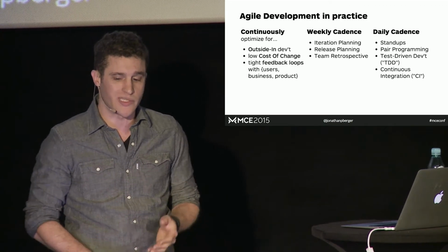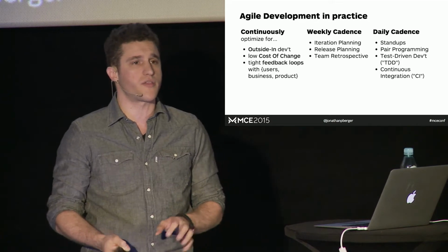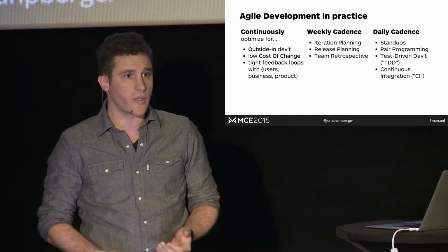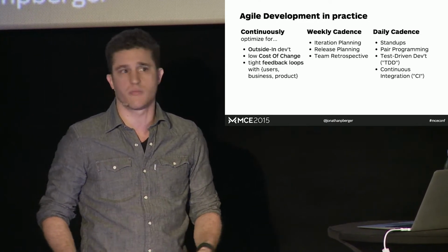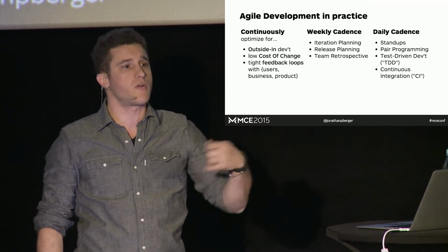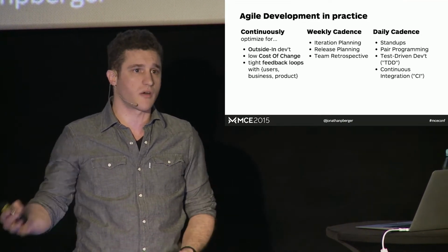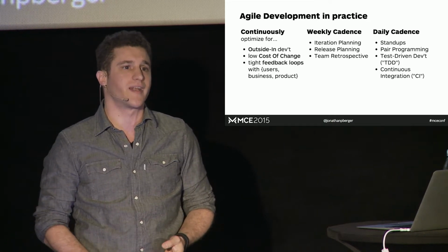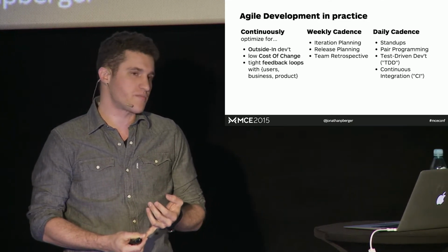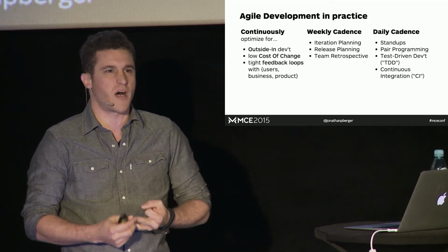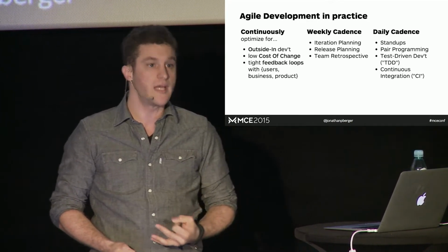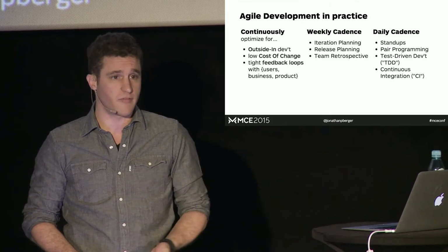We'll also do the more strategic release planning meetings where we say, every week or two or three, how are we doing in the bigger picture? Are we on track for our larger goals? And at the end of the week, we can do a retrospective, and we can get all the team together in a room, we can all open a beer, and we put a smiley face and a frowny face and kind of a meh face, and we throw things on the board, things that are bothering us and things that are going well. And because we're doing it early and often, and we're investing time and energy in continual improvement, people don't get too upset and things don't get to fester and you don't bottle up a lot of steam. We're able to make the process responsive to what's going on the ground. This is very valuable.